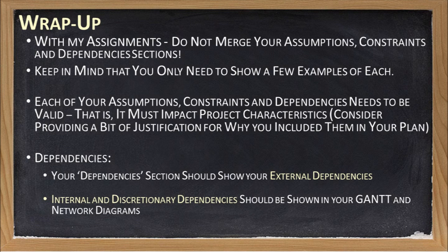With regards to dependencies, show your external dependencies within the dependency section of the template, and your internal and discretionary dependencies within your Gantt network diagrams.